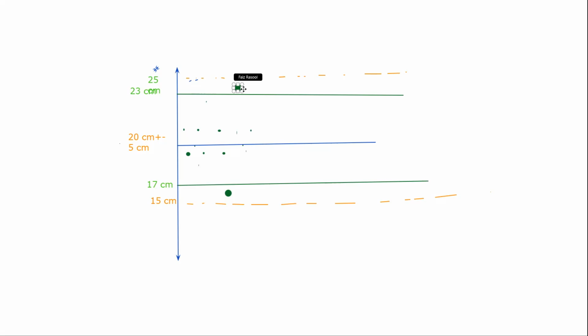It says that this variation is not general cause variation, but a special cause variation that is assignable. It means we need to do some investigation why it happened that one of the pens that was created was with diameter 23.5 or with diameter 16.5.